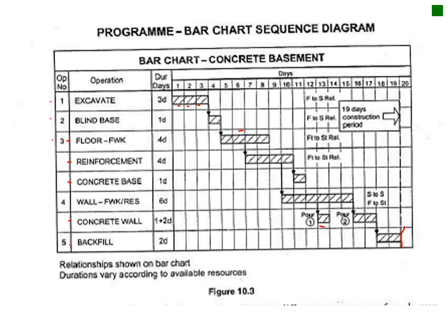So here what they've done is they've started with the placing of the formwork as the one wall is completed, and then as the other walls are being completed, the reinforcement is placed. Then the concrete is poured. You can even bring this forward if you want to. As the one wall is complete, you can maybe pour that one wall if there's a construction joint that you might have to put in between the different sides of the walls. So very simple explanation of how the sequencing works.